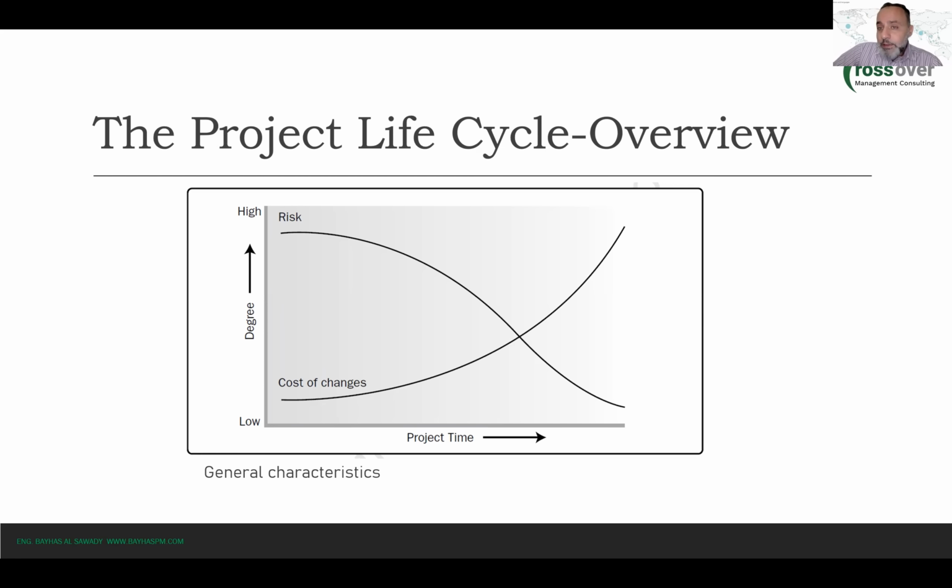The strategy here is very simple. The changes come from stakeholders, right? From the client, basically, from other stakeholders as well. Those are the people who request changes usually, right? And why would they request changes? Because probably we did not listen to them correctly in the first place. Probably we did not gather their requirements correctly from the first place, right? Or not? This is basically the most important reason for having change requests.